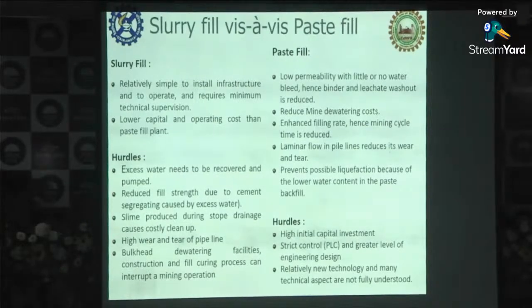Bulkhead dewatering facilities construction and curing process interrupt the mining because of the higher cycle time of the hydrofill. The mining cycle increases and there is a loss in production. That is the thing.